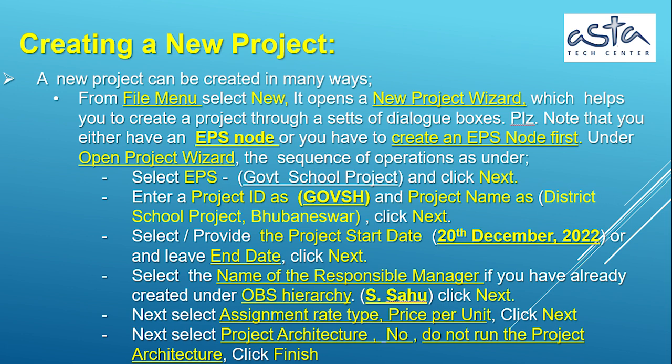Select EPS Government School Project, and click Next. Enter a project ID as GOVSH, and project name as District School Project, Bhubaneswar, click Next. Provide the project start date, 20th of December, 2022, leave the end date, click Next.